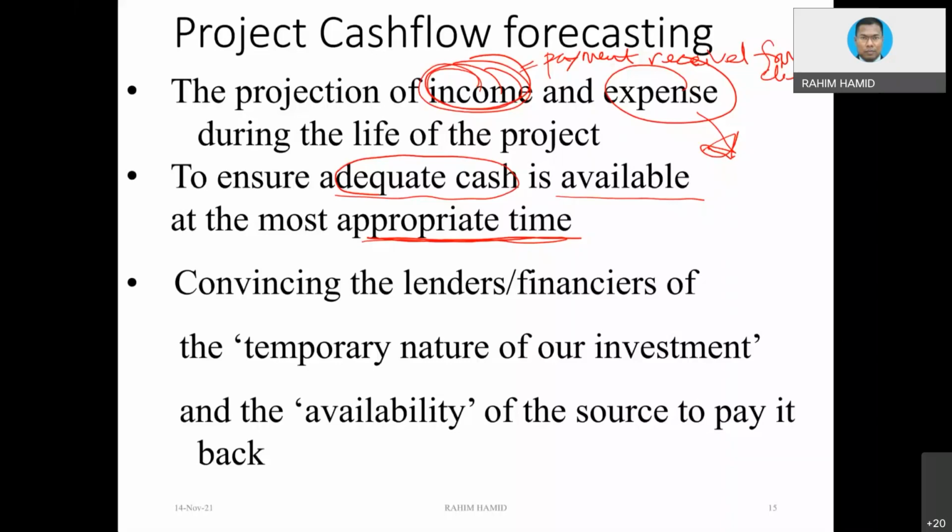You can go to SME banks; I think many banks can give a contractor a bridging loan, but the bank is not going to give it to you just like that. The bank will ask for all kinds of necessary information, such as the projected cash flow, because the bank will evaluate your risk.